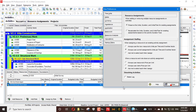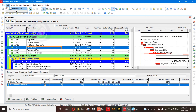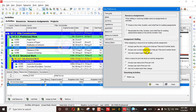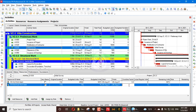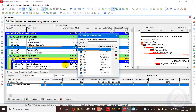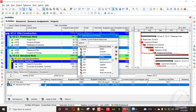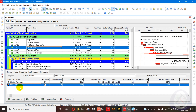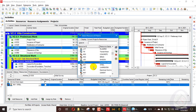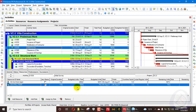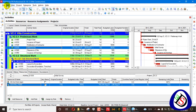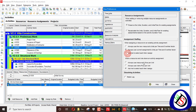In the other setting, 'always use assignment units per time and hour time factor,' it uses the current assignment's units per time and hour time factor. So if the hour time factor is 3.0 and units are 60, when we change to Civil Work or any other resource such as Steel, it will remain 60 and the hour time factor will stay 3.0 — everything stays the same.